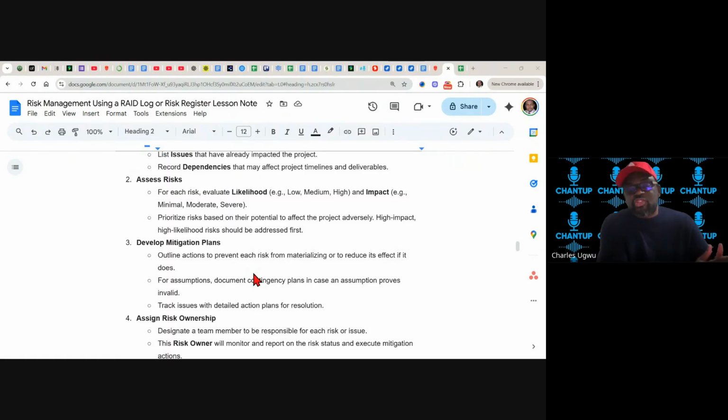So you see, these are 2 assumptions we talk about. We assume that 6 months is enough, and we equally assume that 10,000 as the budget is enough. These are two assumptions. So we plan contingency on all our assumptions, in case our assumption fails. That's how you plan it. So contingency, very soon you are going to be asked, because once you start your project plan, I want to say that.